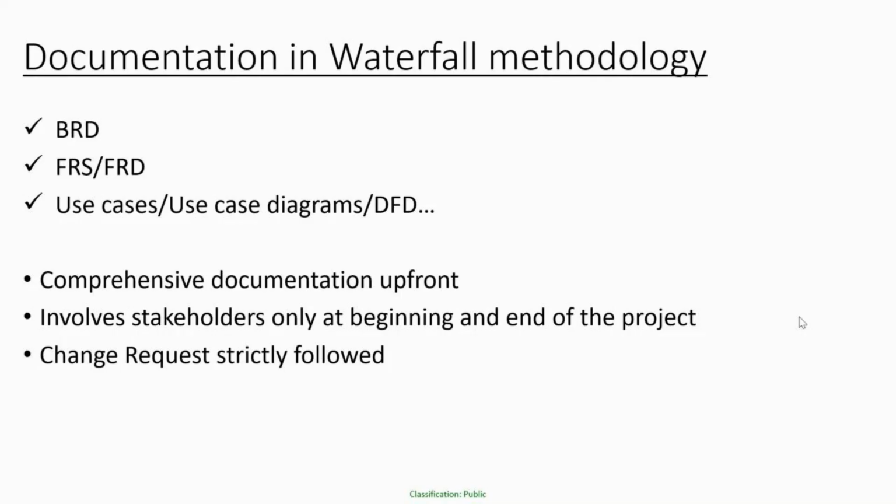So now what I'm saying is when you talk about a software which has to be written for a pharmaceutical company for proper testing of the new drugs that they have launched, then of course the testing process will be strictly documented and followed. You need to create a software application which supports that process. Then what happens? It is pretty much written in stone. There will not be any changes coming up. So there is no change request required at all. So you can follow Waterfall over there. Okay, that's how it works. So this is all about the documentation in Waterfall methodology.